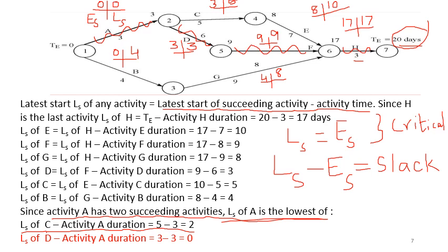And that also 1 day. 1 day delay is what is asked for C. The slack for C is 2 days, 5 minus 3. 1 comes within that particular range. So you can say fine, okay, delay it, no problem, but keep in mind that the project completion should not be affected. So if it falls under the non-critical activities, if it does not come on the critical path, you can always keep that buffer, that slack amount, in cases of emergency.